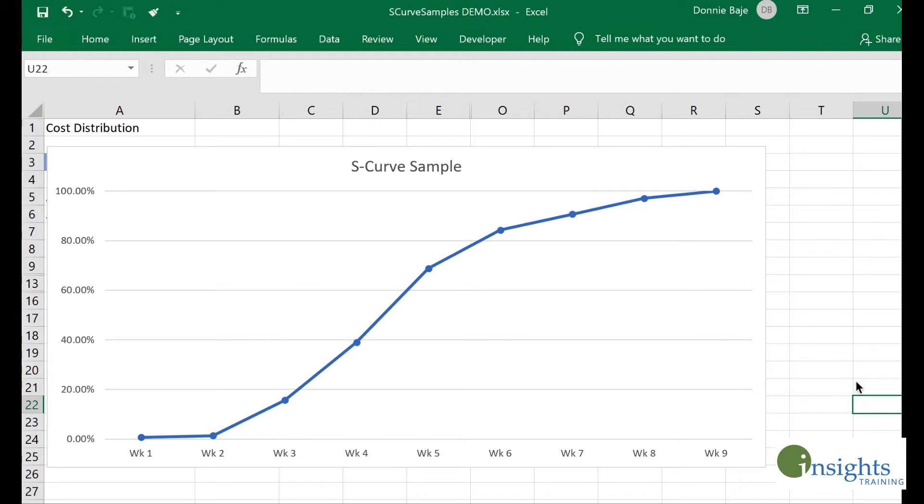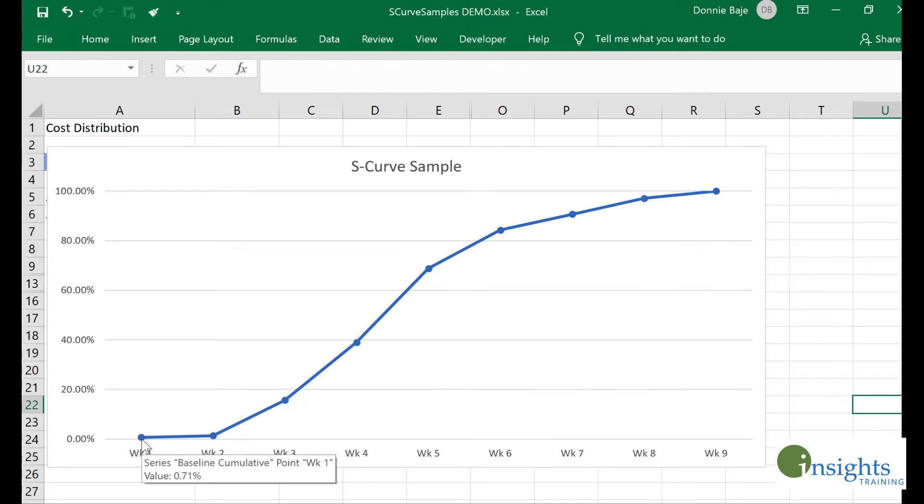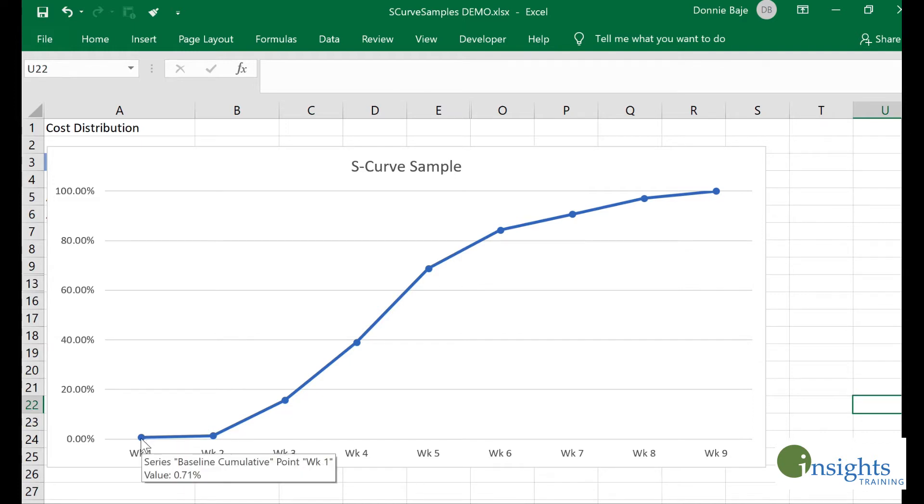As you can see in our example, if I'm going to analyze this S-curve, what it tells me is that this project will last for nine weeks and the cost will start being utilized on week one with very low utilization, only 0.71 percent.